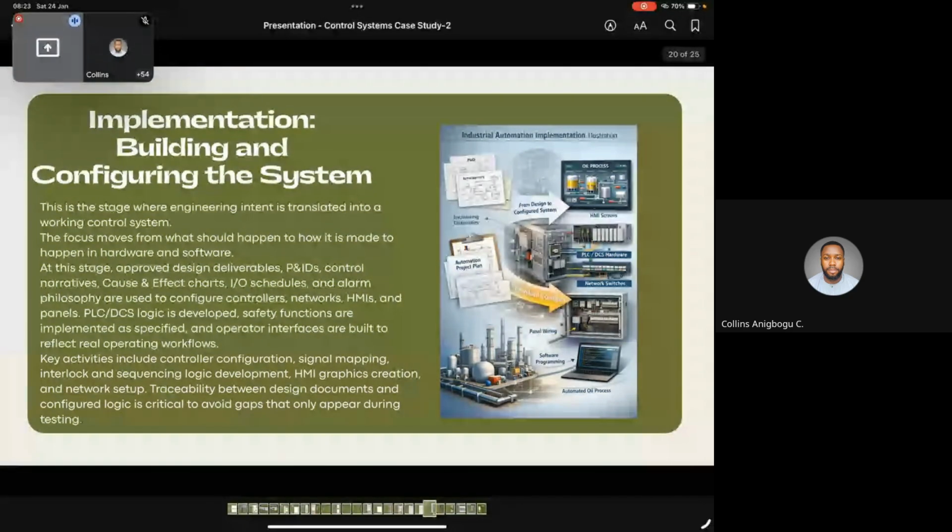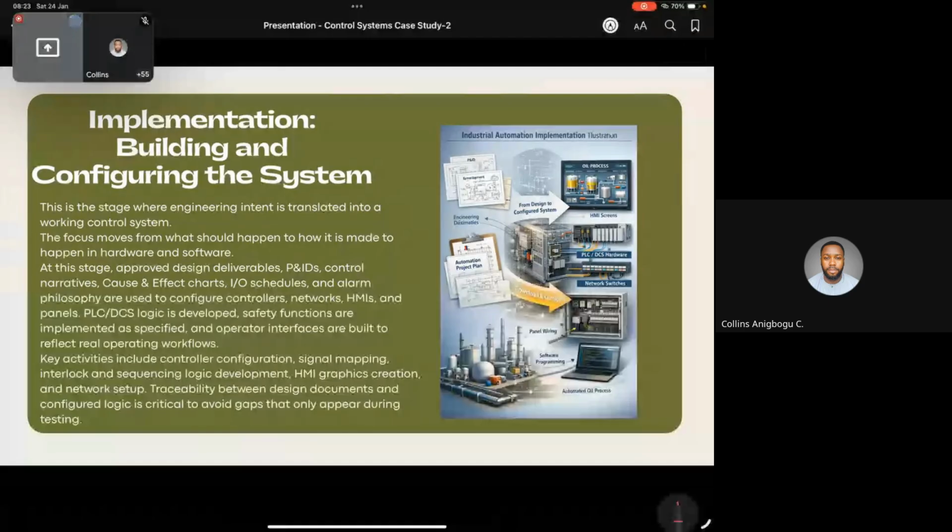Immediately you finish your detailed design, you freeze your BOM, right? You hand it over to your procurement people. They do all the sourcing, and then they do the procurement. Your financial controllers and all of those people do their job, and then the expediters and the logistics people ensure that the materials come to you in your plant, right? And then you begin the construction, right? So looking at the image, you create your HMI screen, right? You know, everything from your drawing.